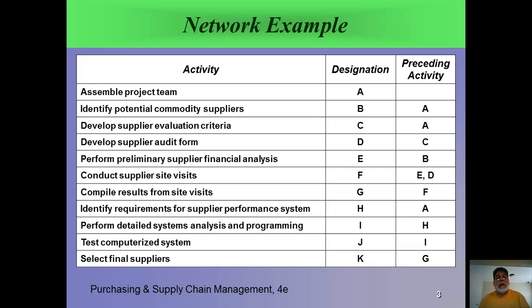Here we have an example using the network version — not the Gantt chart, but the network version. We have activities running from A all the way down to K, with a listing of preceding activities. For example, before you do B you have to do A; before you do C you have to do A. This is a condensed version of your total project showing major activities, each of which can be broken down into sub-activities.